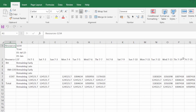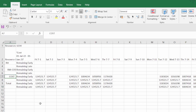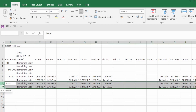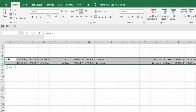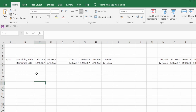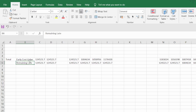Your report is now generated. You can see 'Remaining Early' and 'Remaining Late' cost values. To make this easier, take these values, press Ctrl+C to copy, open an Excel sheet, and press Ctrl+V to paste. Label the columns: 'Early Cost' and 'Late Cost.'